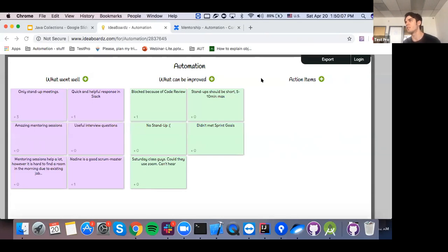So you should say, I did that, I'm blocked on that, and I want to discuss it in the parking lot, so you're not taking someone's time, because someone may be in a rush. It's actually the responsibility of the Scrum Master to control that. Whoever is your Scrum Master, just let them know, let's stick to this rule and keep it short first. In the parking lot, we can discuss it. And you don't have to be there if you don't want to, you can just leave.